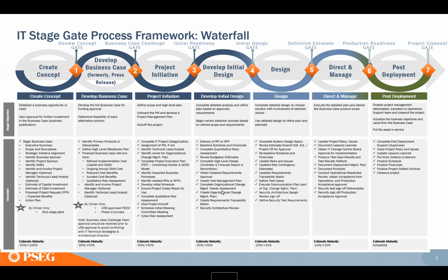You create your test management plan. This is not test cases. This is how am I going to manage tests? Is it multiple test cycles? Who's going to manage that? Who's going to be my testers? Who's going to create my cases? So it's really starting, how am I going to report out, that sort of thing. And there is a template for that.